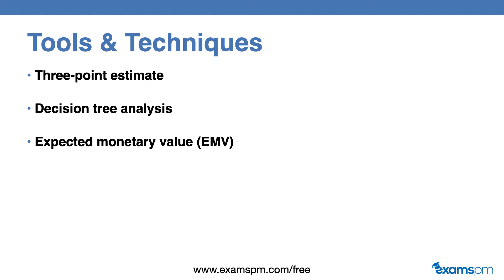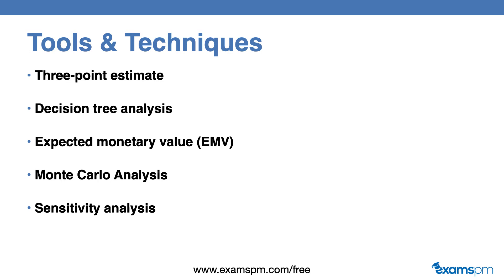EMV stands for expected monetary value — this is a method used to establish the contingency reserve for a budget or schedule. Monte Carlo analysis is a technique that uses optimistic, most likely, and pessimistic estimates to determine the total project cost or completion dates. For example, we could estimate that the probability of completing a project at a cost of $20 million is about 80%, telling you how likely you are to achieve the project at a certain cost level.